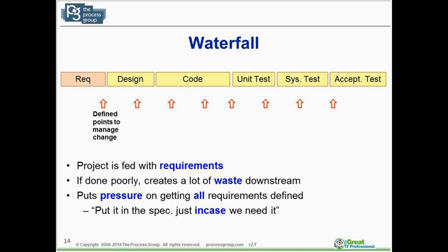Now, Waterfall has its own positives and negatives too. The positive is there are requirements, so activities downstream can be based upon those. But the negative is if that is poorly done, you create a lot of waste downstream. You feed a lot of requirements into downstream activities, and although you may discover they are bad or inaccurate requirements, a lot of work has been spent already, for example, by unit tests, to then figure out these are the wrong requirements. And obviously, when you get down to system tests and acceptance testing, at the very end,